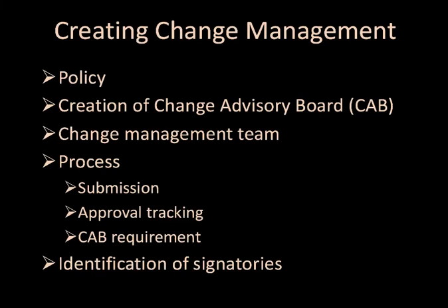The policy should clearly state that no change may be made to production infrastructure or systems without passing through the change management process. As we discuss later, this means the process must include how to make changes during business continuity events. The oversight body of change management is often known as the Change Advisory Board, or CAB. The board is responsible for developing change procedures and making decisions regarding potentially high-risk changes.